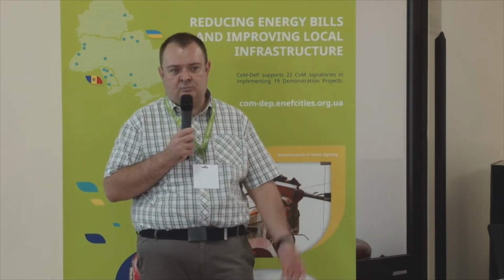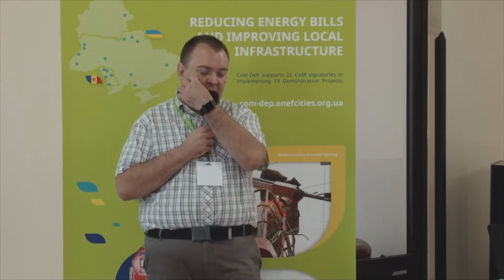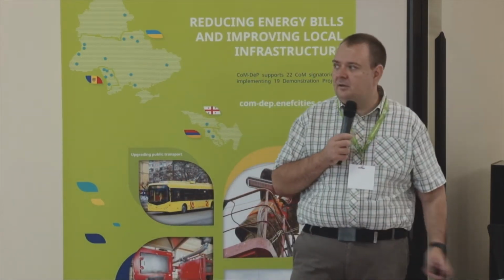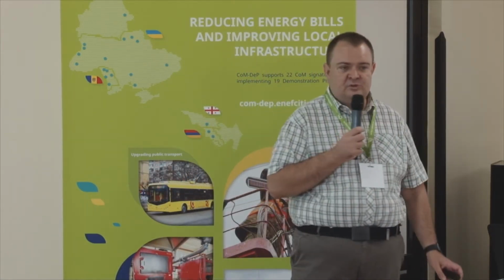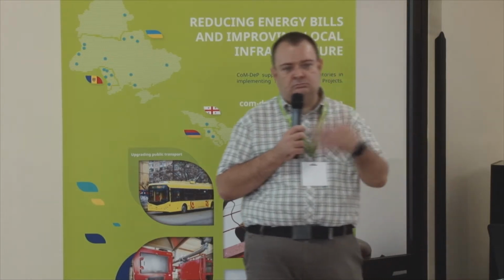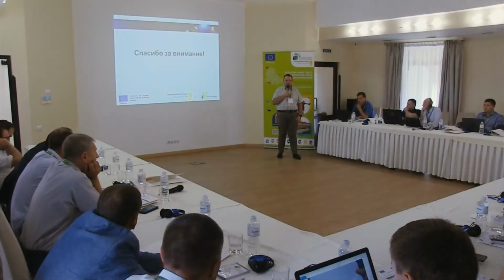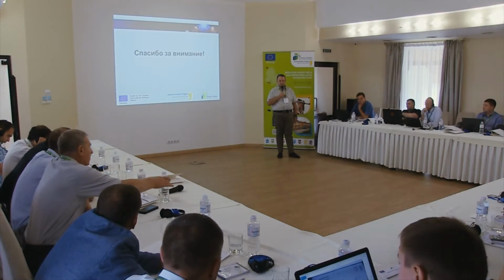And I think you will have at least 3 months in order to prepare measurement and verification plans and to do monitoring of energy performance at the sites. And as a result, you will be able to have the final values regarding those effects you have obtained after the project was implemented. That is everything about the project cycle. In case you have any questions.